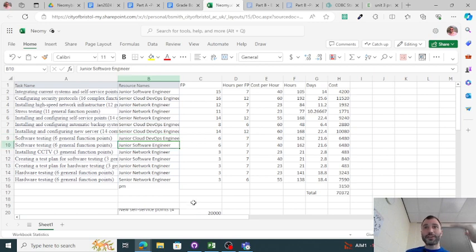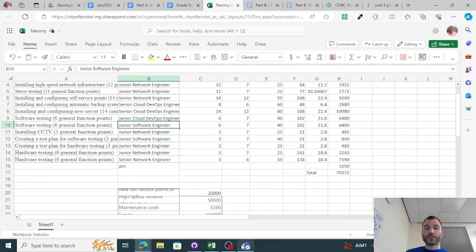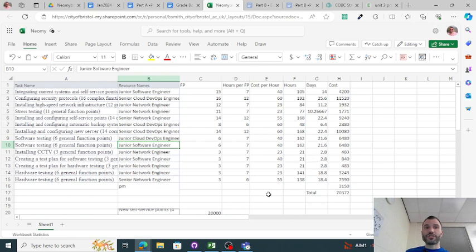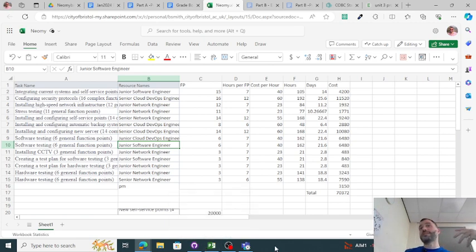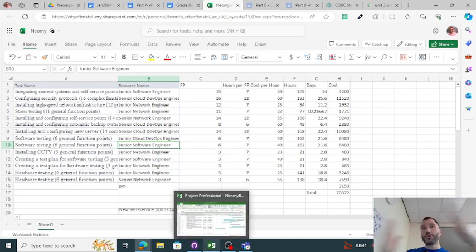So I split that task between two. That meant they both took on half of the hours. So 120 hours extra each. 120 hours extra is about 4 or 5 days extra instead of spending 10 days each, which would end up pushing them over the project.